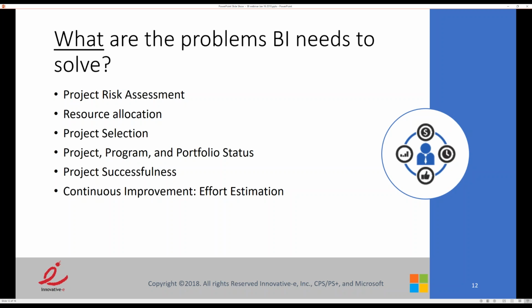Of course, there's other things out there, Monte Carlo simulation, where you can run that on a project and kind of figure out where your holes might be, but that's just going off of your project, right? It's not going off of dozens and dozens of past performance projects, using lessons learned and how to perform better. And then going into that continuous improvement of, we're constantly 20% off, 30% off. Well, instead of planning to constantly be 20 or 30% off, let's see if we can make a difference and really analyze why.